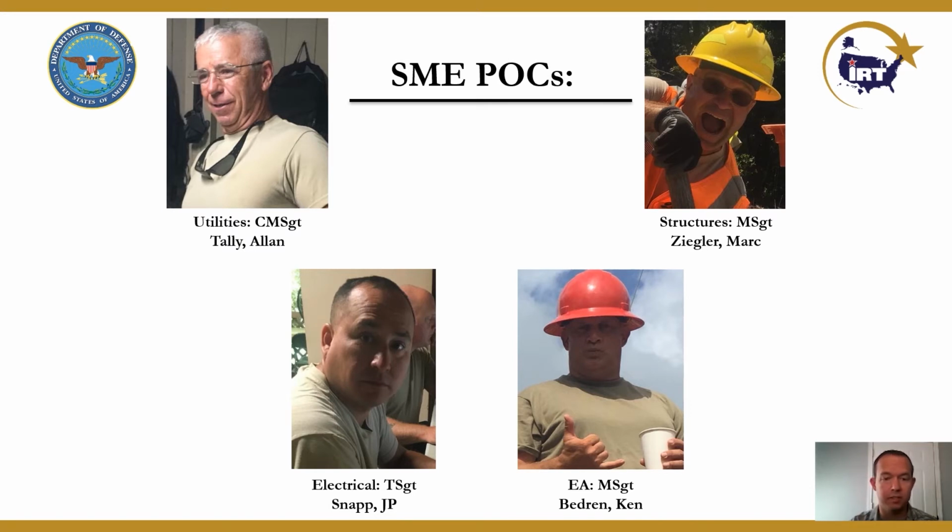So, for example, electrical here, Tech Sergeant Snap would work with any local electrical contractors and electrical inspectors. Everything here is permitted, and he's learned the local codes and ensures that all the rotations are conforming to these local codes. And again, he works with the inspector to make sure everything meets code.